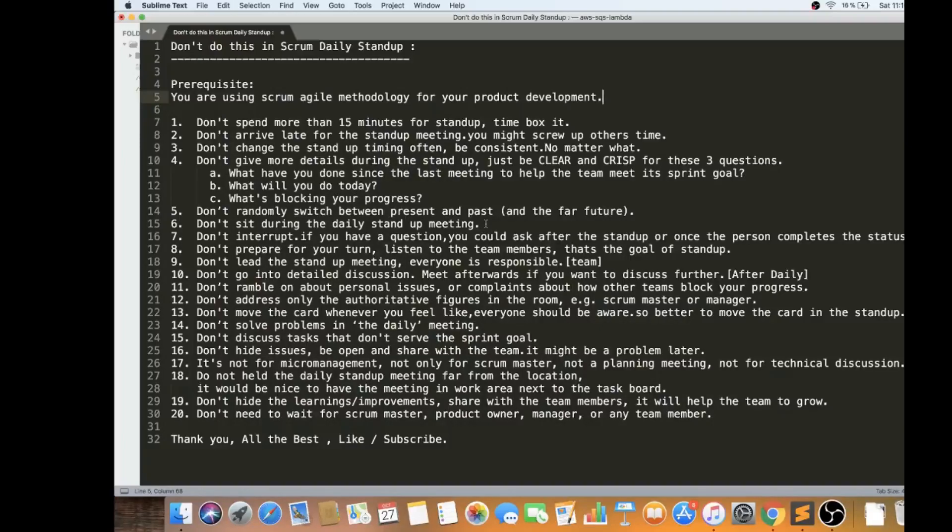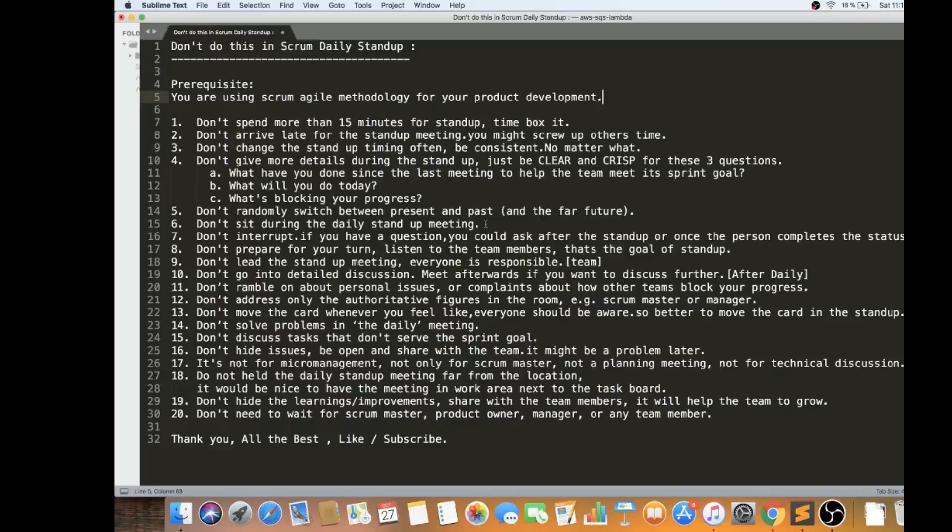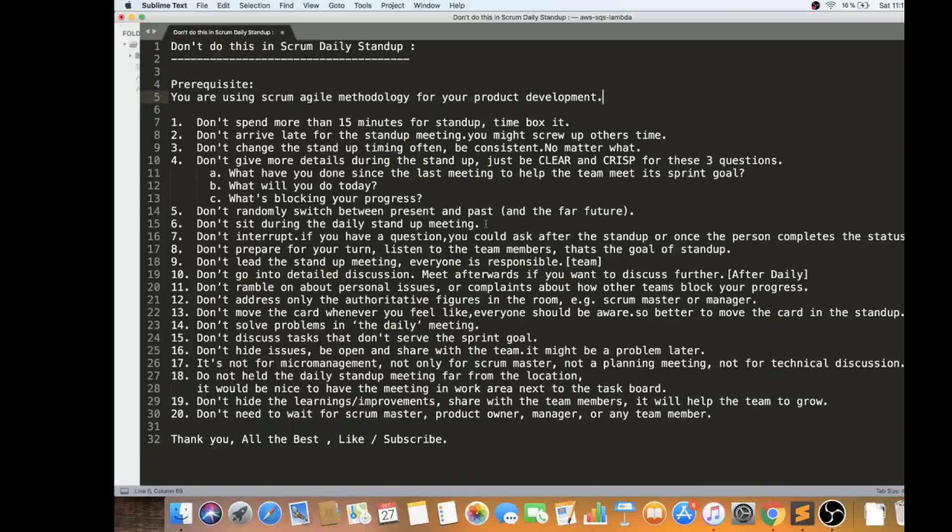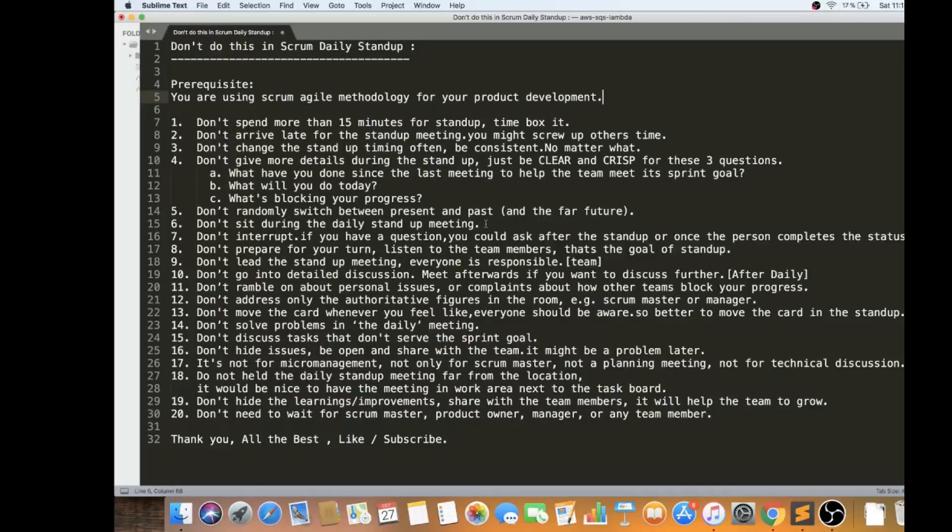Very important, the sixth point is don't sit during the daily standup meeting. The intention is it should be short and sweet and crisp. That's why they made it a standup meeting. The moment team members sit, it becomes an update meeting. Someone will lead and then someone will be hosting the meeting. Please don't sit during the daily standup. Since it's 15 minutes time boxed, please don't sit.